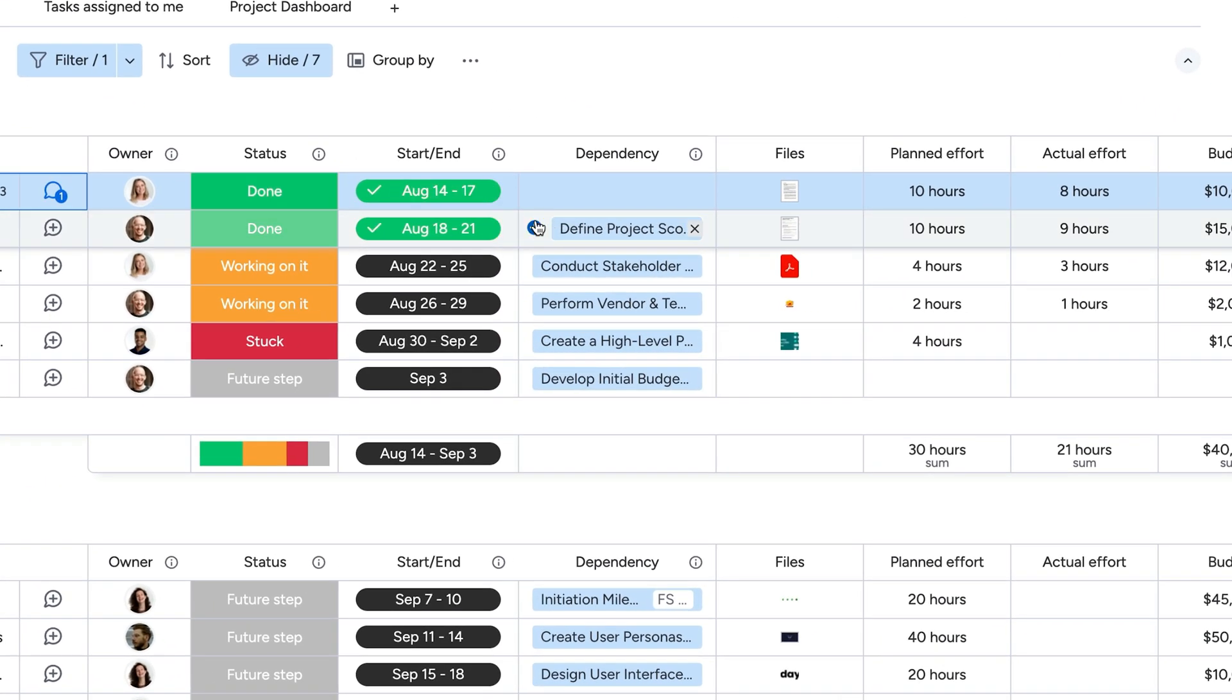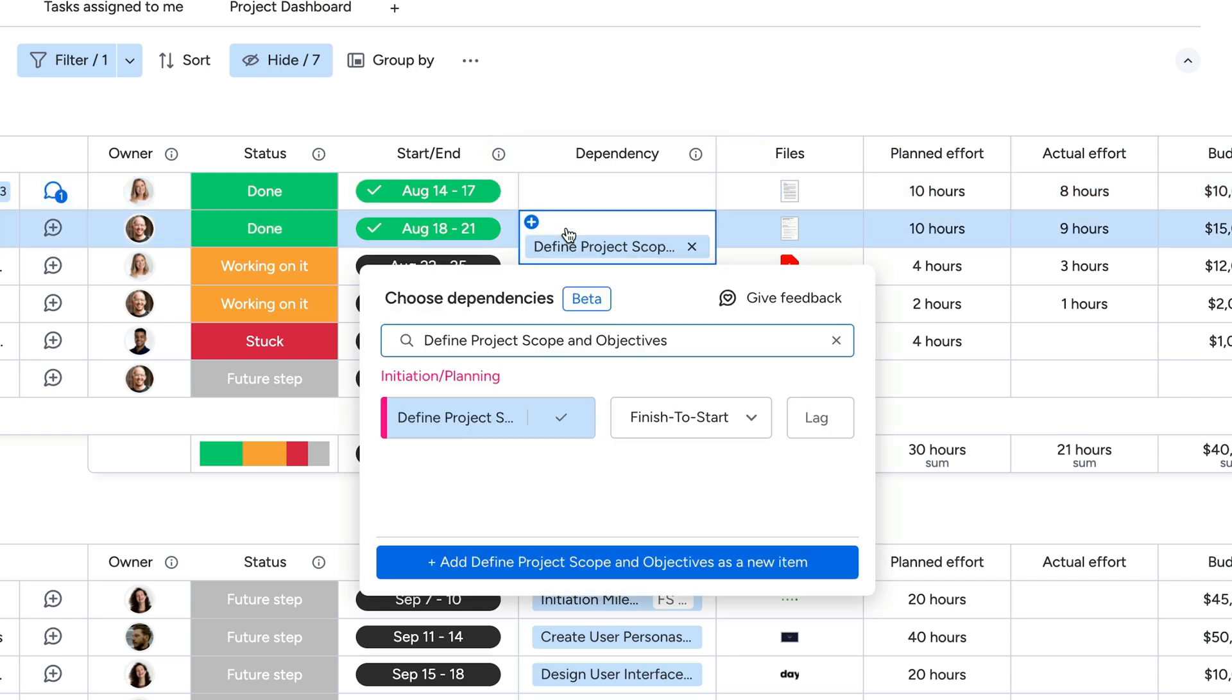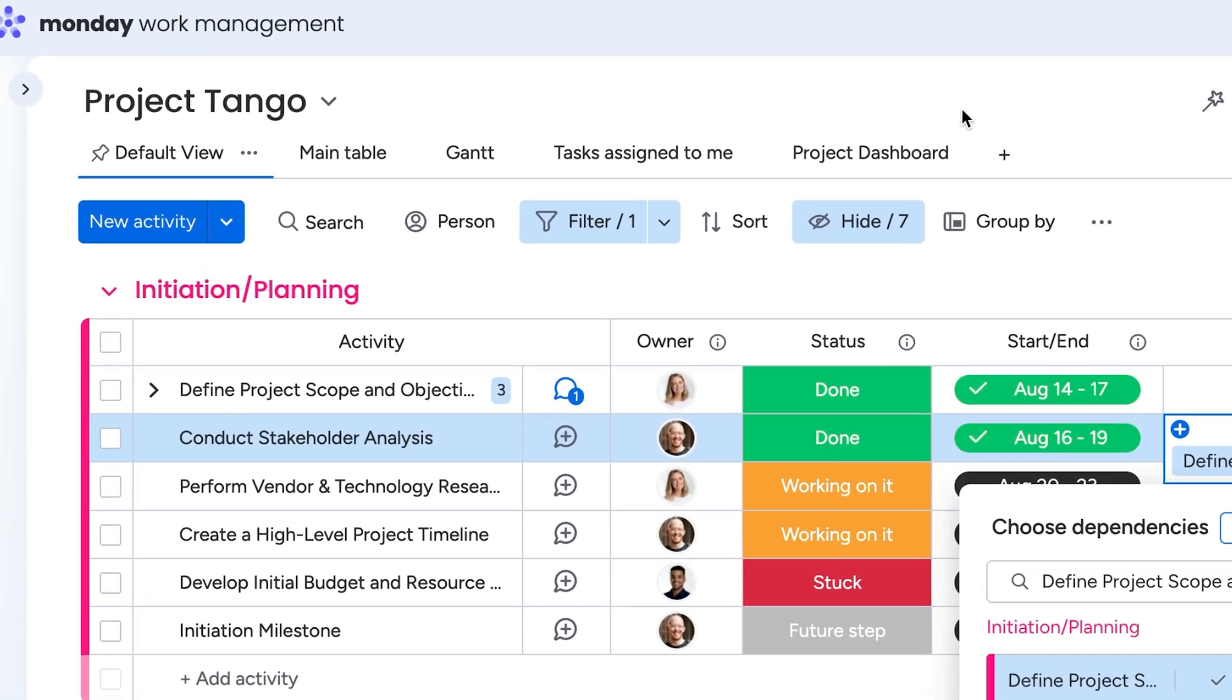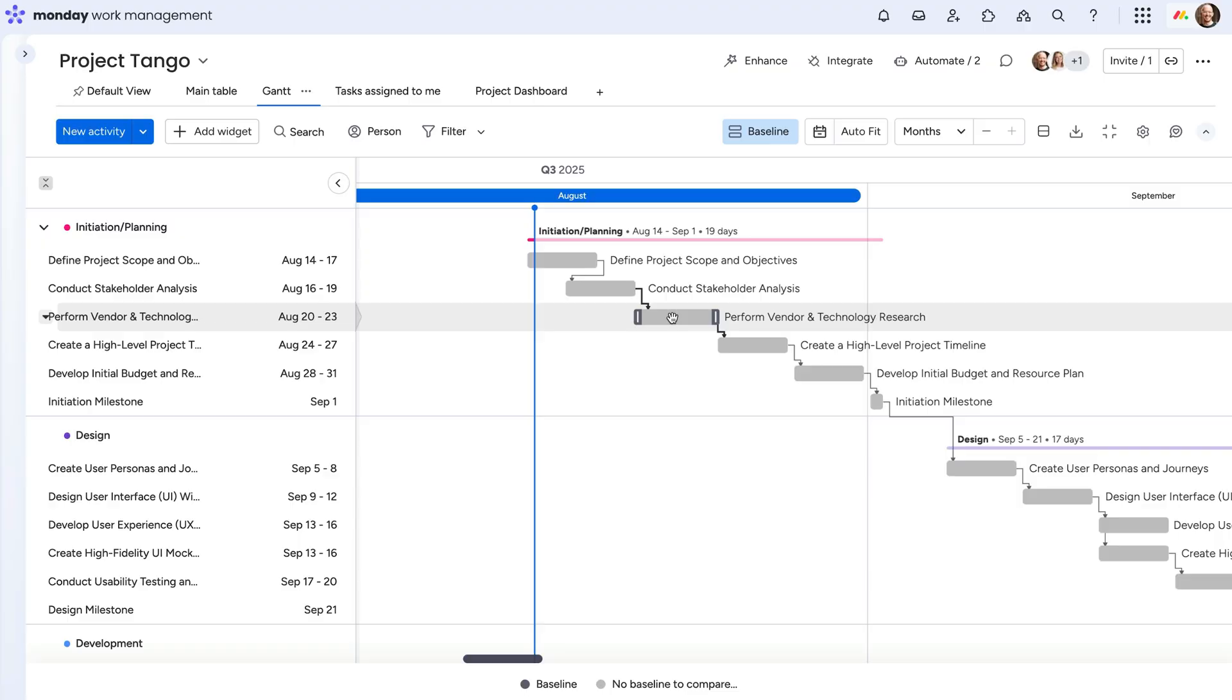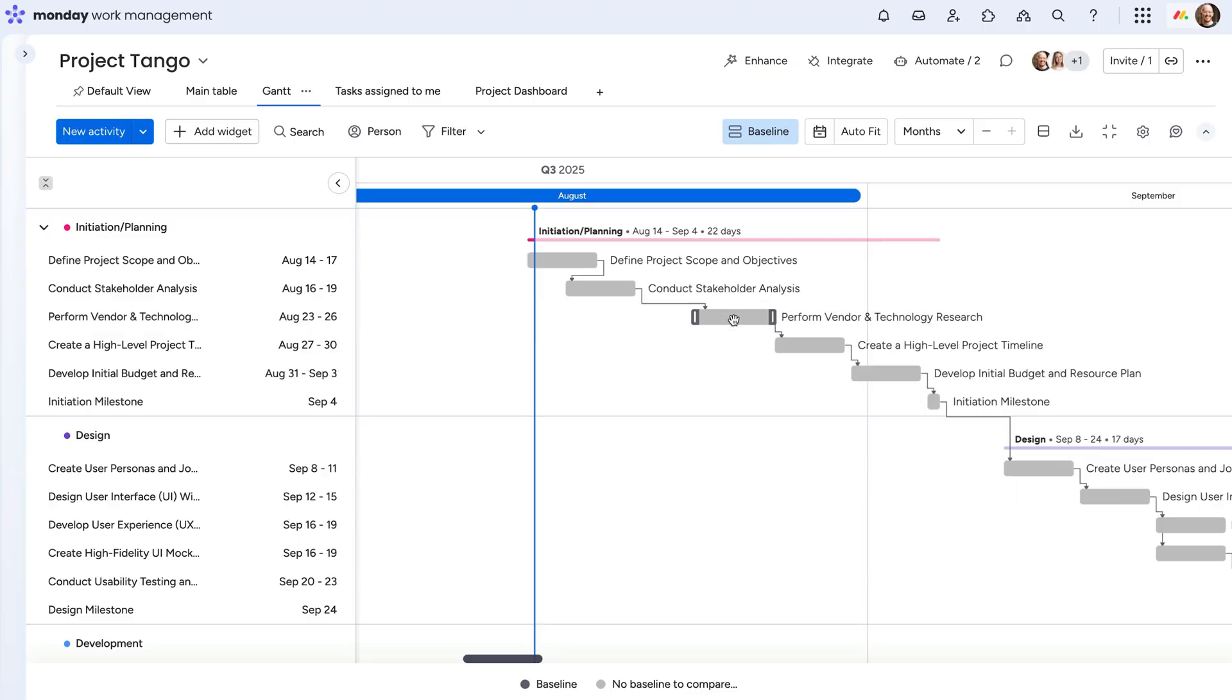Create dependencies between tasks and account for any lead and lag times. And visually track it all within the Gantt view, super helpful for zooming out and spotting overlaps.